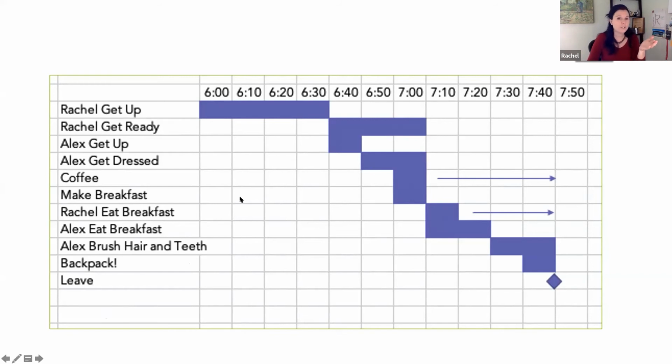And of course, once you build this, let's say this was a plan for a house build, and each one of these tasks was a different contractor or subcontractor, like plumber, electrician, roofer, sider, concrete guy, whatever it might be. Then I could actually start adding up. So here in, let's say, July, I have 1, 2, 3, 4 tasks happening at the same time, which means that A, I'm going to need more money, and B, I need much tighter coordination than when I just have one thing happening in the beginning.